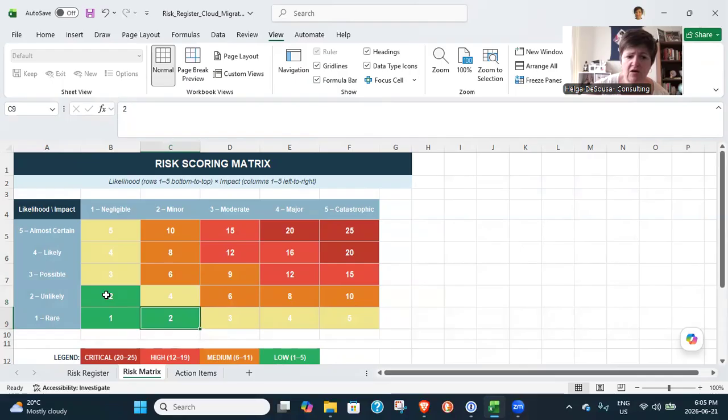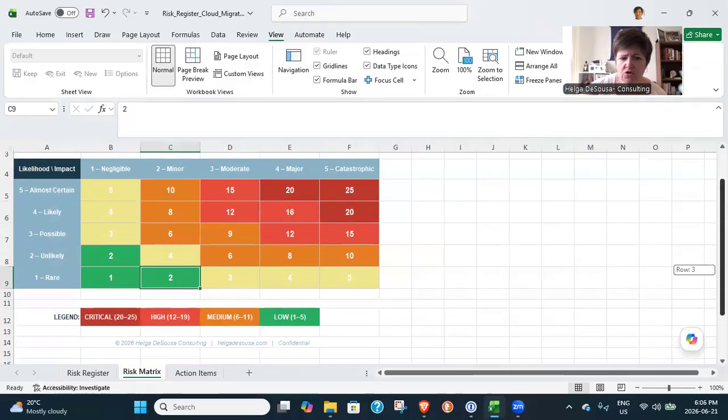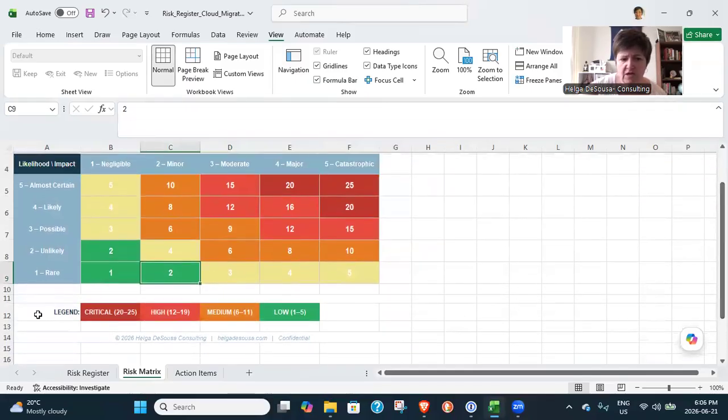And then, of course, here you're monitoring it. It's not going to really hit you hard, but it's monitoring that. So that's why you would have it in green there. Okay. So these are things to keep in mind. So when you're identifying a risk, you need to say what color status it is, what health it's in, so that you could highlight to your sponsors if something's really going to curtail this project, or it's going to be a huge impact, and so forth.